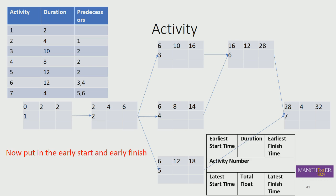We could turn it around and call it the beginning, if I was being consistent, but it's got to be the end of day 2 because it's a duration of 2 days at the beginning, so it's got to be the end. Just to mitigate that confusion, sometimes people get the end of and beginning mixed up. So being consistent, it takes two full days, end of day 2, and so on. Consistent. So you get to activity 6,